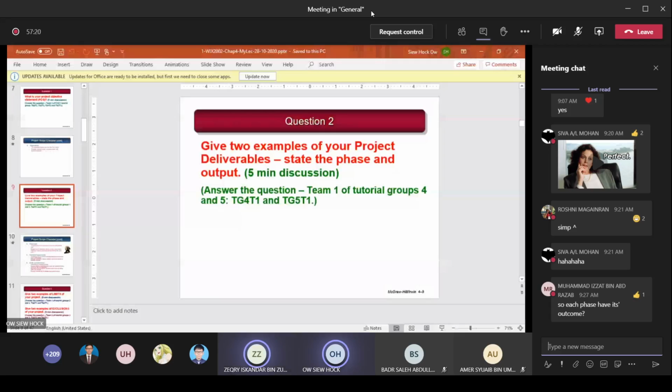And then the next one is assessment, which is to collect data from the respondents. Okay. So that means this assessment phase also includes two main tasks. One is the data collection from respondents, and then you can analyze them. In that case, the deliverables are first the 120 sets of data you collected. Next is the listing, tabular format or the graph to analyze, because yours is a HOTS assessment, and then you want to study whether there's any correlation, right? So these are the outcome of your data analysis. That will be your deliverables.